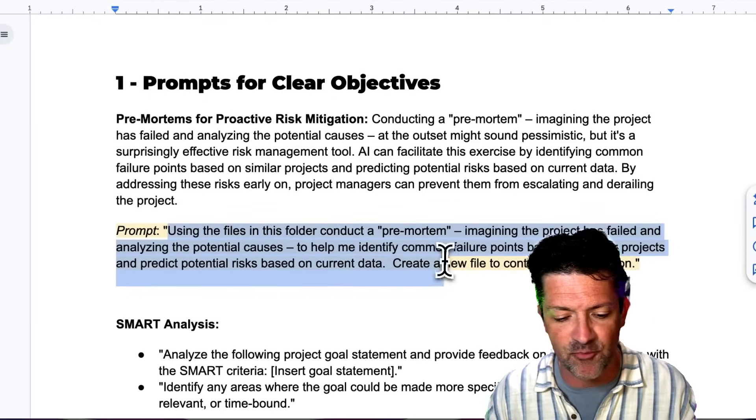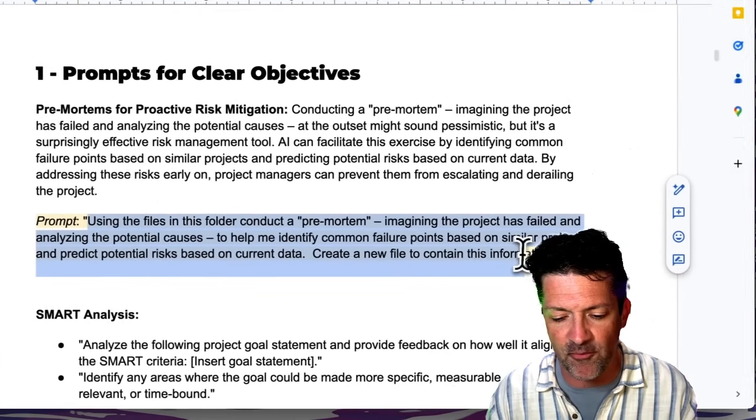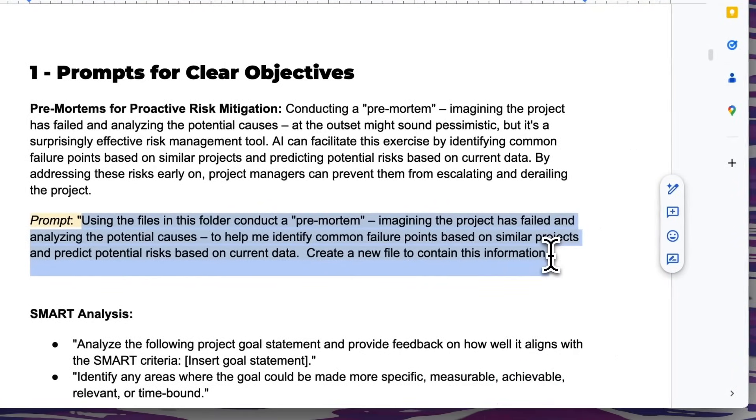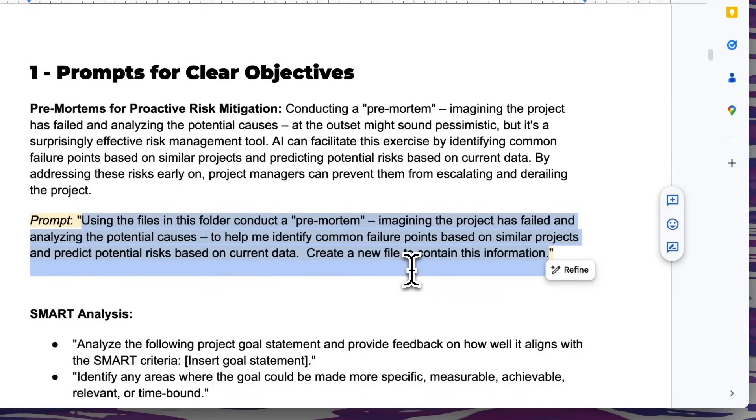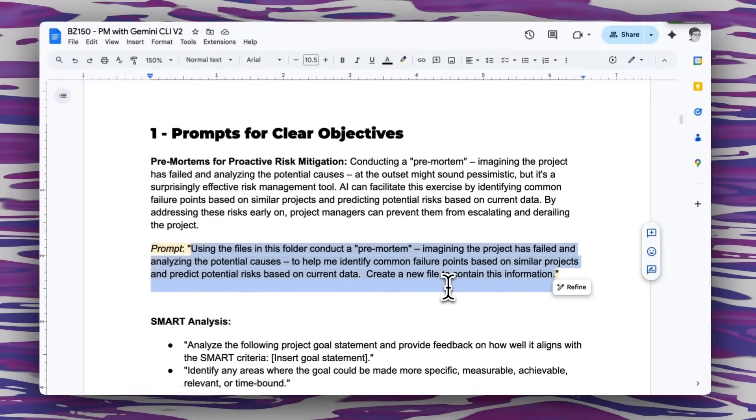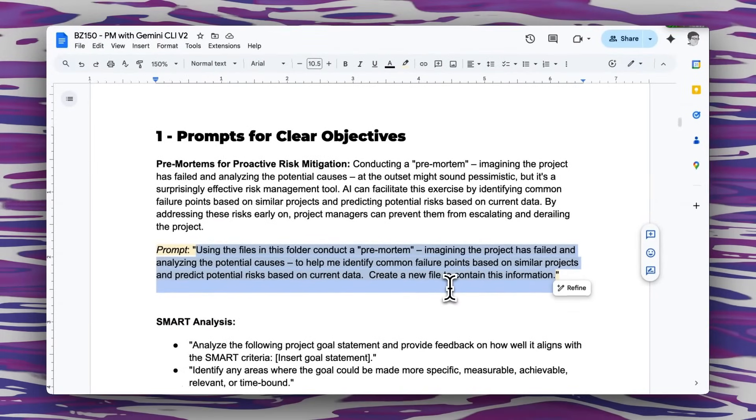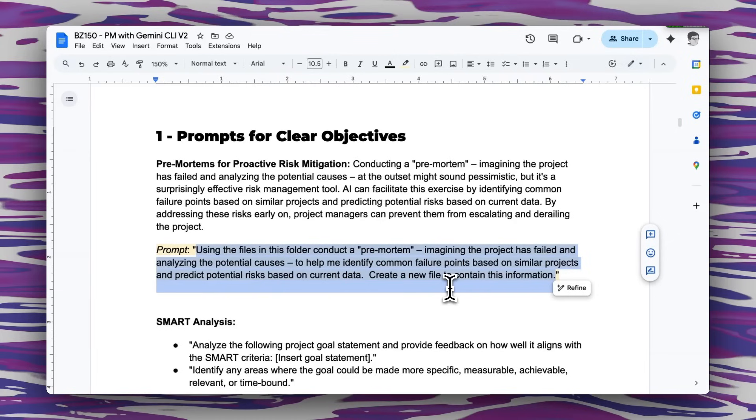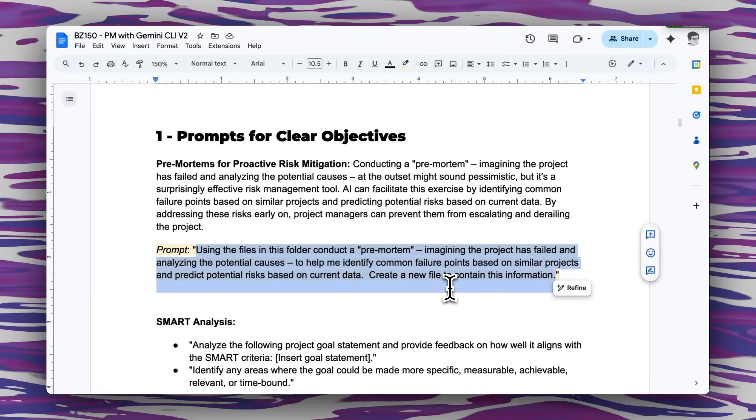There are a lot of ways to use LLMs to create clear objectives and smart goals but this is my favorite. This is the pre-mortem prompt so this basically just says using the files in this folder conduct a pre-mortem imagining that the project has failed and we're going to be analyzing potential causes, help me identify common failure points based on similar projects and predict potential risks based on current data. Create a new file to contain this information.